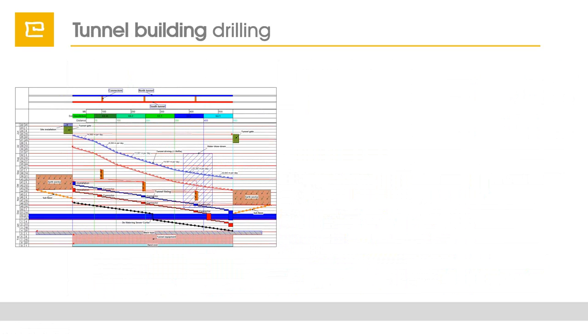There is no Primavera, no MS Project. It is just done with our product, with TILOS. The challenge is to get the quantity-based cost as well as the time-based cost, because, for example, if this tunnel drilling machine has monthly costs of up to 500,000 euros, and if this machine is not working, this is just costing money, and we try to make the usage of this equipment as short as possible by optimizing the building of this tunnel.